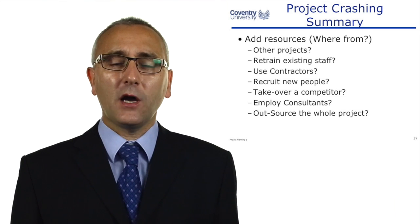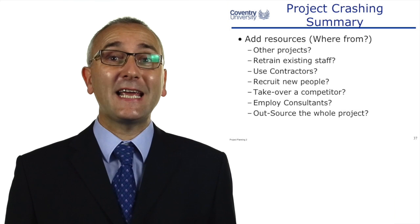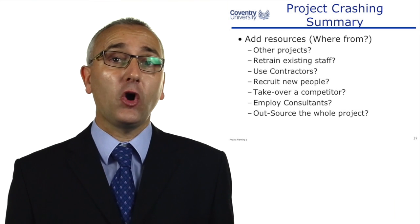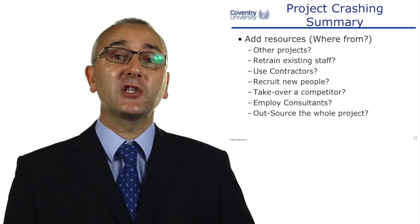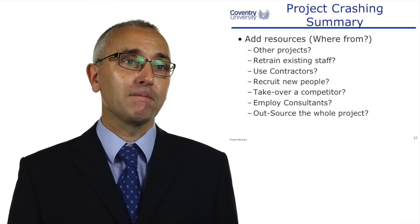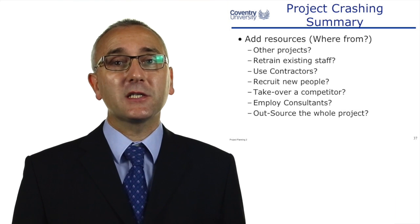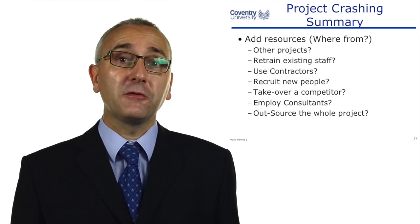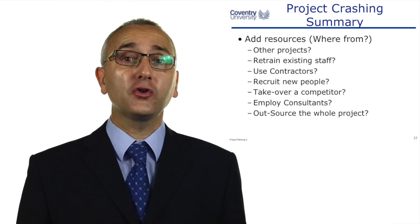If the project can't deliver to meet a particular date the company requires, one option is to buy a competitor — maybe they already have that product. Buying a competitor, cancelling their projects, and moving their staff to us is an option available. Employing consultants to look at the project plan and the way we're working can help sort out how we save some time. Outsourcing the whole project is another option — some famous vehicle manufacturing design projects in the late 1990s, like the Range Rover redesign, were created not by Rover or BMW engineers but by an external design contract house.